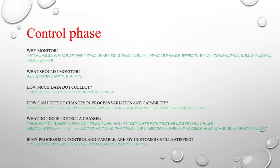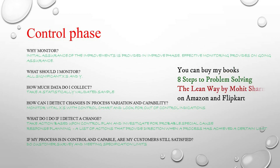The next question is: what should I monitor? We need to monitor all significant X's and the project Y. Y is a function of X, and we need to control all significant X's impacting the project Y. We also need to monitor Y because there could be any other X that might start impacting Y over time that we are not currently monitoring. Monitoring Y gives us that indication.